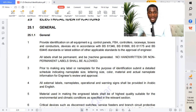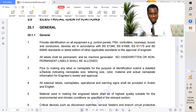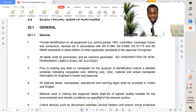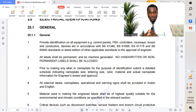All labels shall be permanent and be machine generated. No handwriting or non-permanent labels shall be allowed. This is very important. We can place handwriting labeling while doing temporary labeling during the installation works, and then later while submitting for inspection, we place the permanent labeling which will be machine generated. Prior to making any label or nameplate for identification purposes, submit a detailed schedule indicating nameplate size, lettering size, color, material, and actual nameplate information for engineer's review and approval. Like I mentioned, we are going to submit a method statement which will have all these different identifications for the different services, color codings, and how they are going to be placed — as per the engineer's requirement, which is very important.